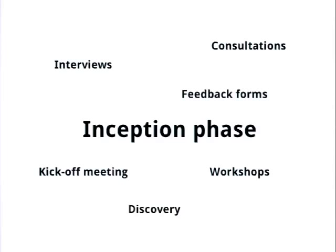The other things in your inception phase are workshops, feedback forms, and consultations. Use the vision you've established to get an idea of how the work is going to be shaped. For example, if a project is strictly about the front end and improving the end user functionality, that's fine. But if you find through your consultations that actually the web CMS editors hate the current CMS, then that's going to really shape the rest of the project — and they might not have mentioned that.